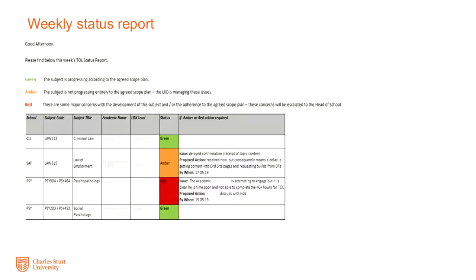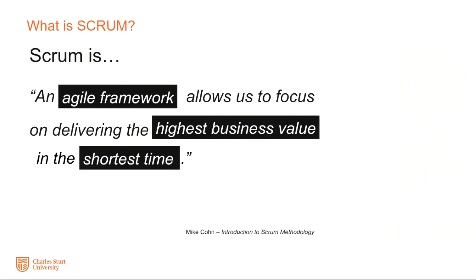So we're developing subjects over a 4-week period. My team would have about 5 or 6 subjects within a 4-week period to develop. And at the end of that 4 weeks, those subjects are completed. So early intervention is really important. So again, we're using a SCRUM or an Agile framework, which is a project management methodology, and that is where the sprint type approach comes into it.